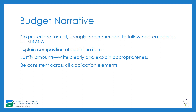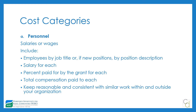Since I recommend writing your budget narrative according to the object cost categories, let's go through each. First is personnel — salaries and wages of positions or portions of positions paid for with grant funds. Fringe goes on the next line. Subrecipient personnel goes in contractual. For the SF-424A as lead applicant, personnel includes only those you pay directly. Include employees by job title, the salary, the percent paid for by the grant, and the total compensation across the entire grant period for each position.